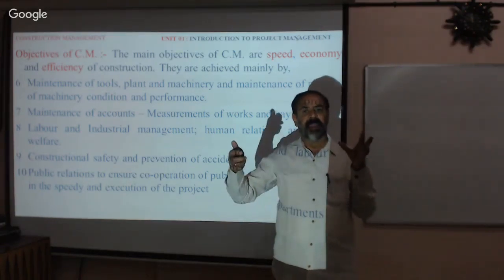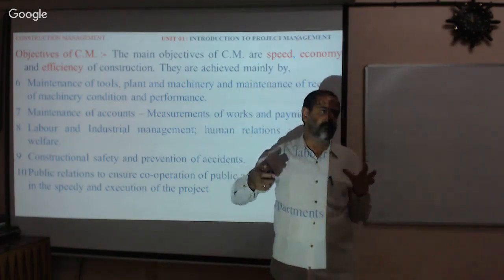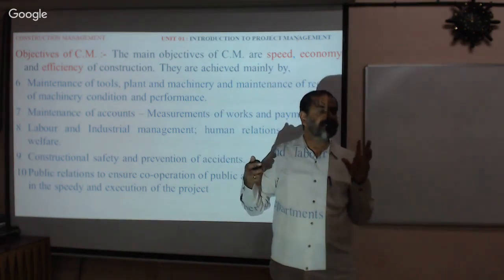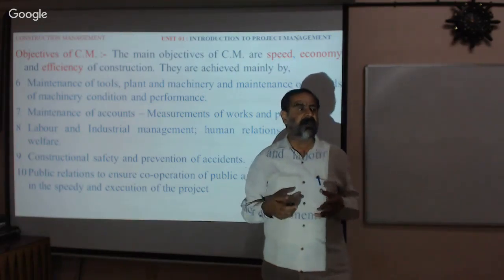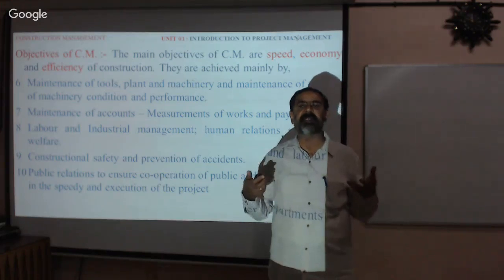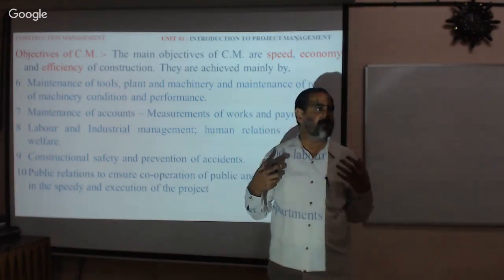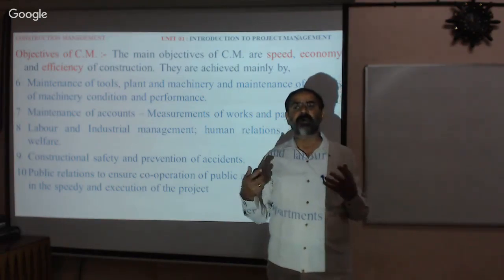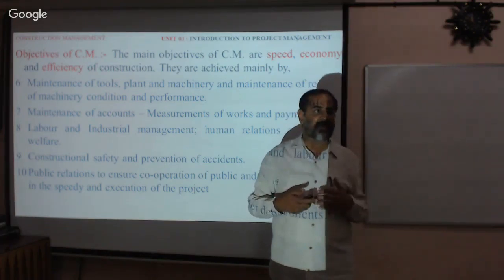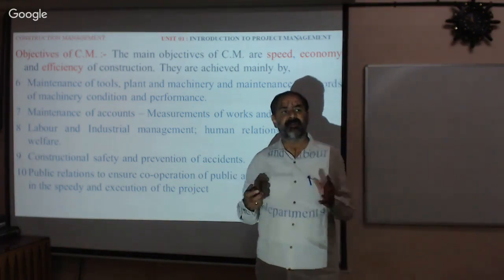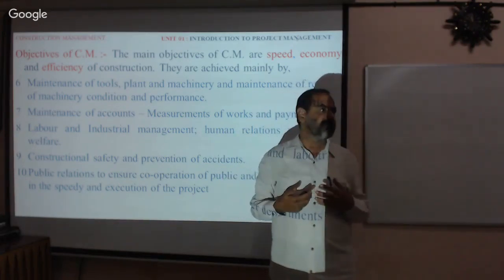Now you have a construction team. That construction team comprises many people: engineers, architects, designers, supervisors, technicians, drivers, masons, etc. Apart from that, we have neighbors around us. Neighbors are the most dangerous part. We must take their goodwill and manage them in the proper way. Otherwise our project will get delayed by the people around us.